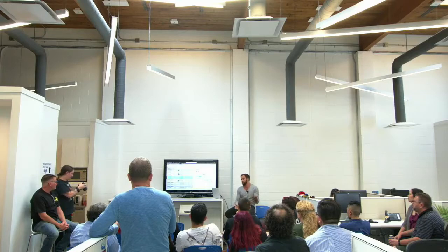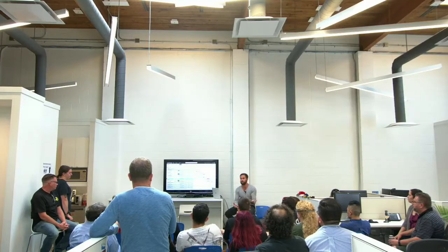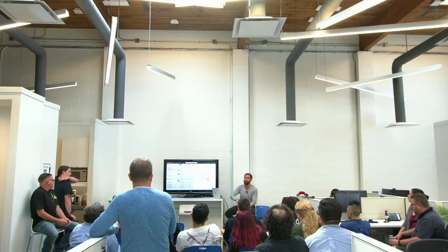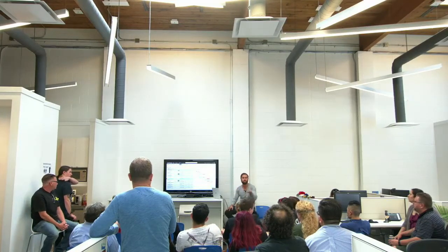And now what you can do with Shotgun, which is exciting, is throw a waterfall past it and say, okay, given this start date and this end date and this duration based on our bid, here's a first pass at our schedule. It's not super exciting when you're looking at just one shot with 4 different tasks, but if you're a client and they're submitting 500 shots, and very quickly you have to give them back a result of, okay, well, based on where we are right now and the number of artists we have, we're looking to deliver at the end of August. Shotgun can be your eyes and ears early on to get that first brushstroke. It may not be your final schedule, but it gets you there very quickly.